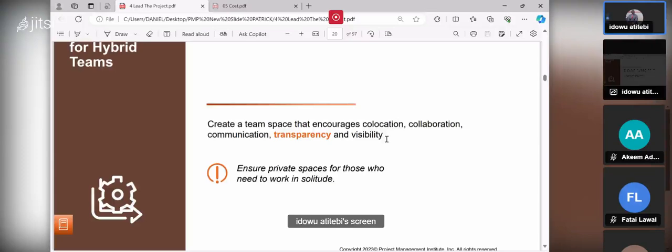This is what we plan to do. You put it in one column. The next column, this is the work in progress. You always limit work in progress. This is what we have done partially. This is what we have completed. So that means you make everything transparent. If I have completed something, someone else will not go and start doing such a thing.